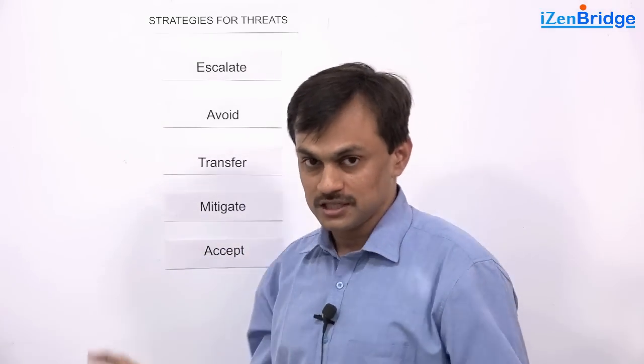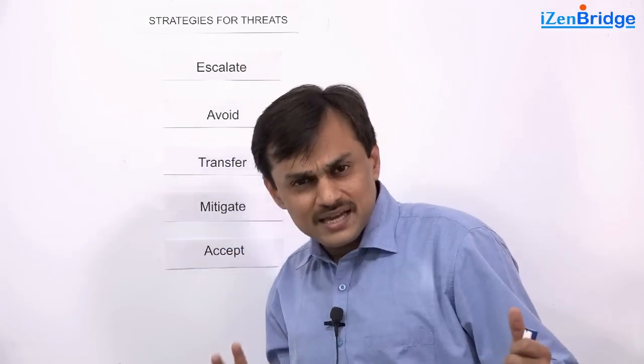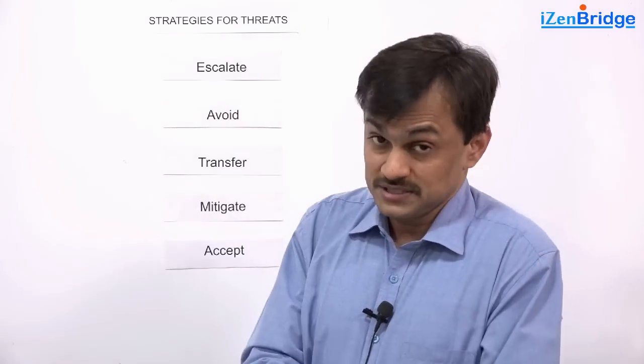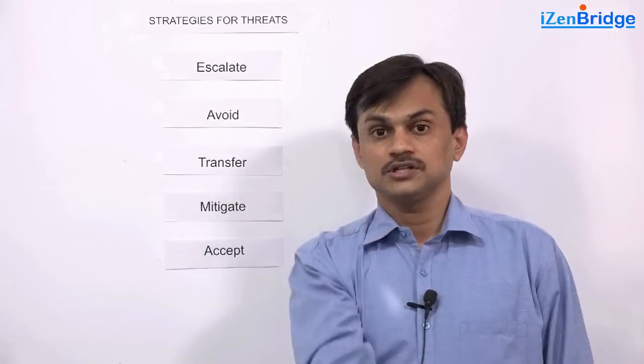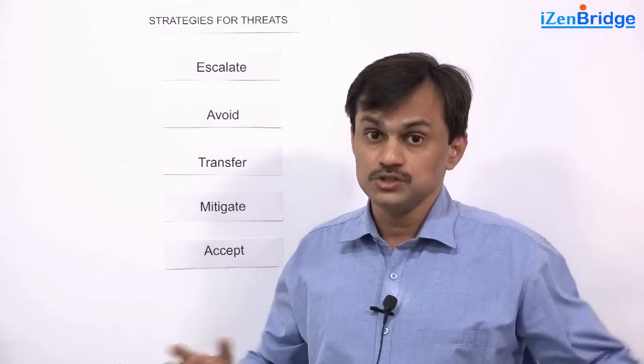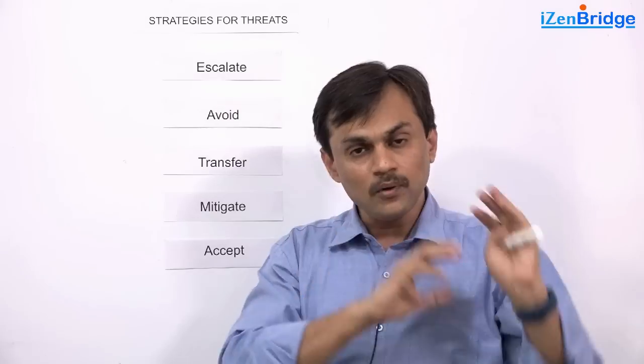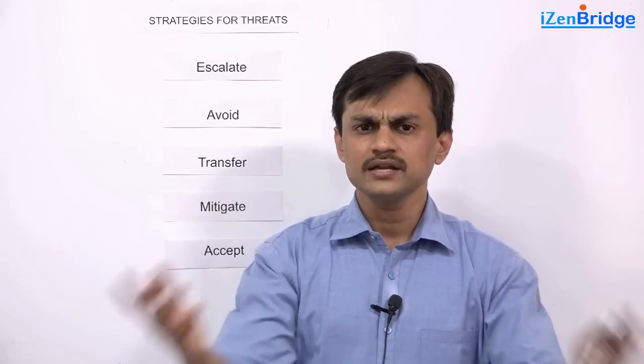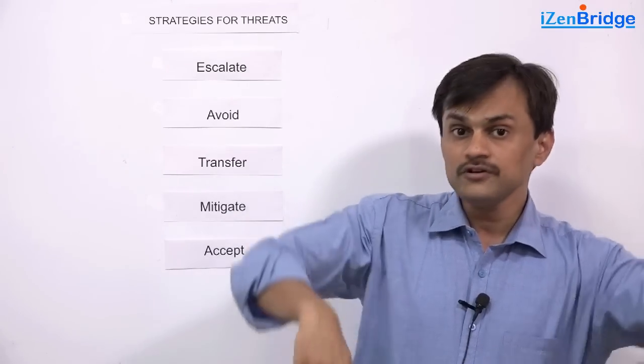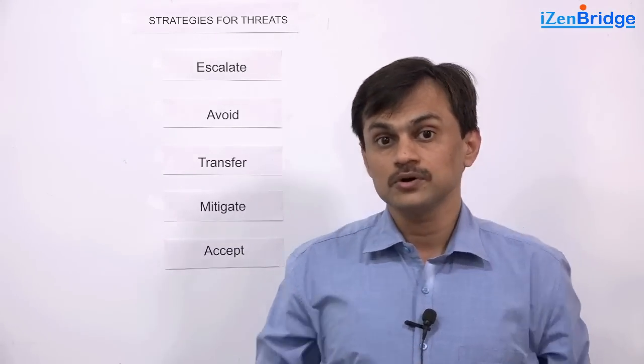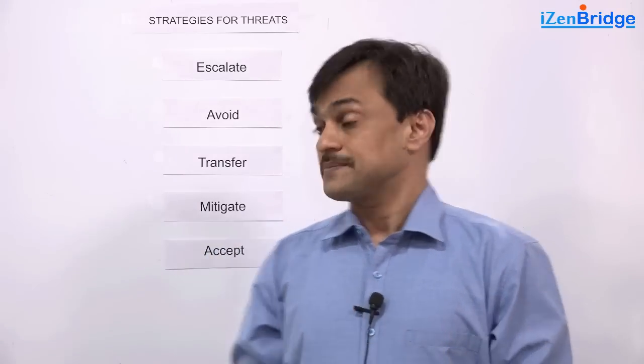Somebody wants to leave the project team, you sense that risk, you mitigate it by adding one more person with him. The person may still leave but if he leaves, your impact is less because the other person will take care of it. It is a mitigation strategy. You reduce the impact. The other possible strategy could be you speak to the person and say what is wrong with you? What can we do so that you feel happy about it? And then he agrees on something, you agree on something. You reduce the probability of the person leaving. You mitigated the risk. Still the person may leave but the probability has been reduced because you did some proactive steps. Mitigation.